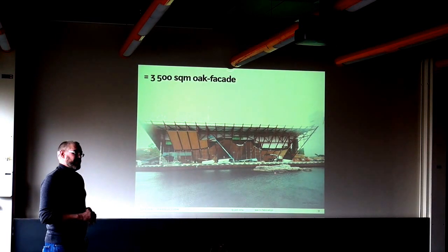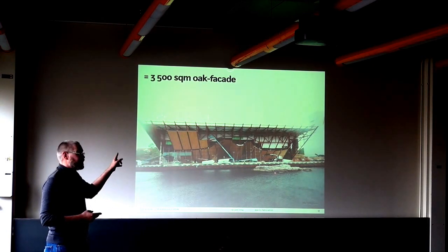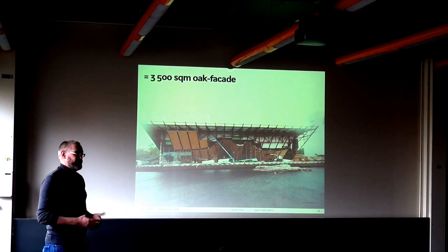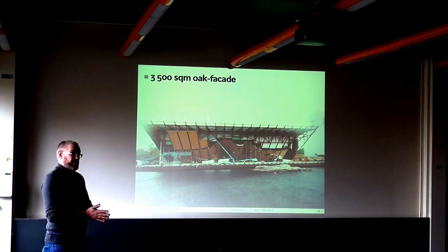Which was tight because they wanted to set up the steel frame when we didn't have any 3D model or plans of the facade yet. So we had to decide where to drill the holes for connecting the timber elements before we had the timber elements. Happens. This is the building industry.